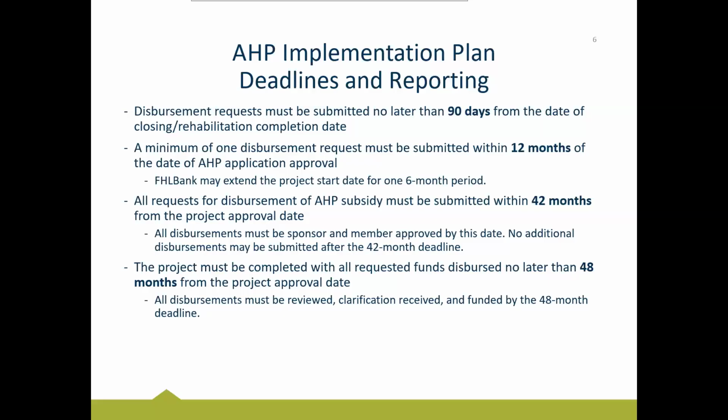So you have 90 days from the point that the work on the home is finished to submit the disbursement request into us. The submitted point has a little bit of a caveat or a definition to it as well. Submitted means that you have both sponsor and member approve the disbursement.